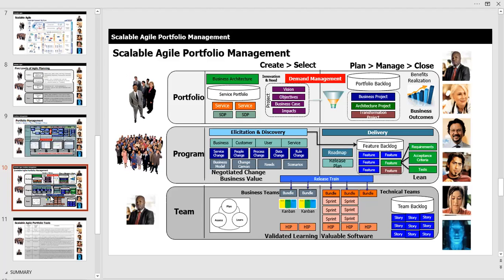In the project estimating, I showed you how there was 3 phases of planning. Discovery, so here you see the word elicitation and discovery. So that's the rough order of magnitude planning. Then there was the planning phase, which we got into. And so I said under discovery, we used expert judgment and planning poker, and then we transitioned into what we call the iterative planning phase, where we talked about a more detailed version of your roadmap that would fill up your backlog, or a cloned records of a previous project that would fill up your backlog.